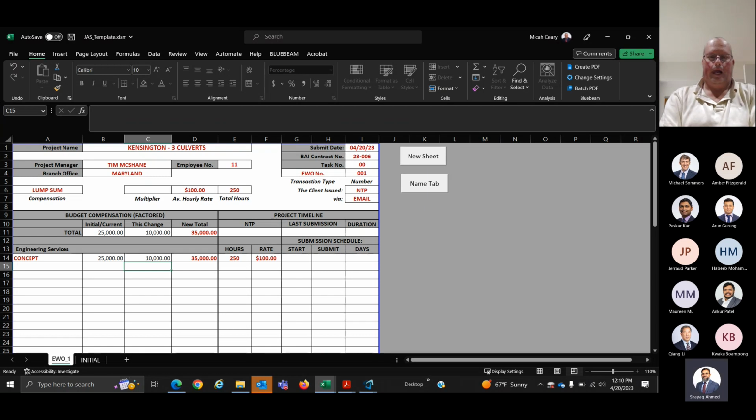It's important to note that if it's the compensation, is it a lump sum job? Is it, what is the other option? Time card or time card plus? Yeah, so that's very important. Otherwise, some of the projects can be lump sum jobs. That's when whatever amount is left will be left as profit. But we need to identify these. It's very important in here when you set up the project first. Correct.